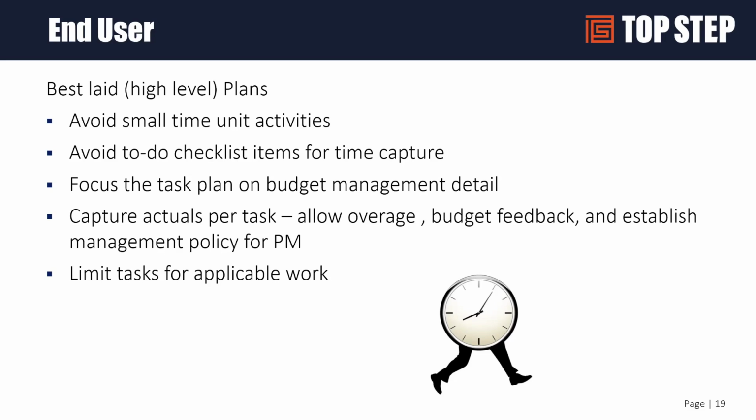Capture your actuals per task. Limit your tasks. So if you're using project plans that are 300 or 400 tasks, consider if you need to do that for time capture. You may need to do that for project management, but do you need to do that for time capture? It's a good question to ask.